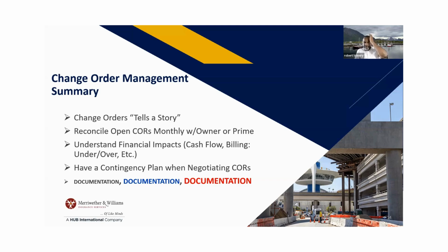Reconcile open change orders monthly with the owner or prime to minimize your risk exposure of not getting paid, or not getting approved on change orders, or them coming back and wanting to negotiate. You want to get them done sooner so they really can't come back to negotiate.